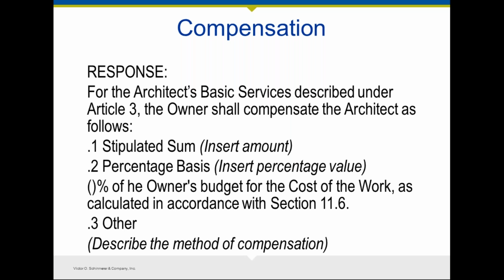So be very clear about your payment amount, what is required, and what your rights are if the client decides not to pay you. Beyond just the compensation amount, you need to make sure that you tie in what the remedies are if the client suspends payment or stops paying you. What are your rights? Do you get to suspend your services upon notice? Do you get to eventually terminate the services? And so what is your recourse to protect your rights?